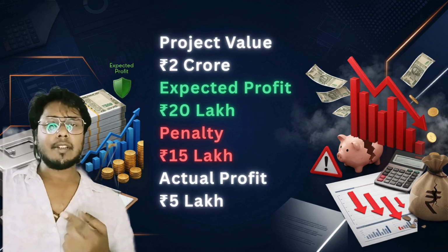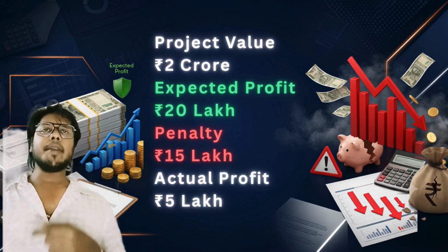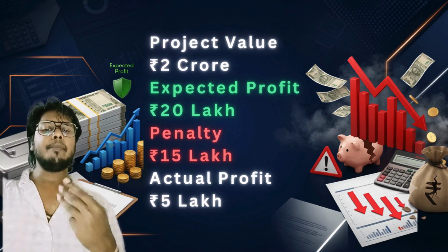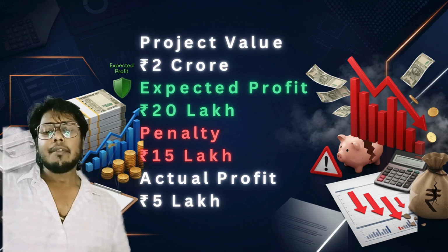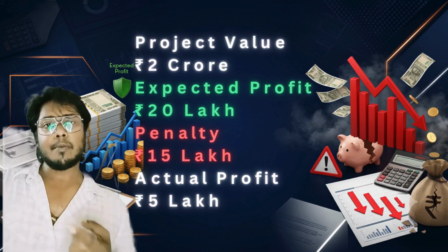Let's look at a simple example. On a 2 crore project, you expect a 20 lakh profit, but heavy penalty deductions reduce it to just 5 lakhs or even zero. Winning the tender doesn't guarantee a profitable project.